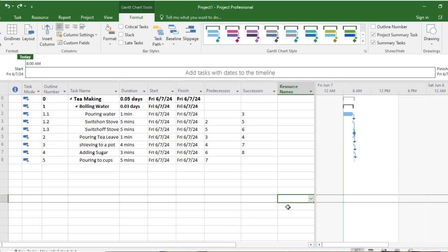But again, this is also a kind of problem, as you don't have any role in that. It schedules in a complex way. For simpler projects, it's an advantage. For much more complex projects where many overlappings and adjustments are there, if it is automatically scheduled without understanding the constraints and the problems already faced, then it will be a bit problematic for the project manager to control it.